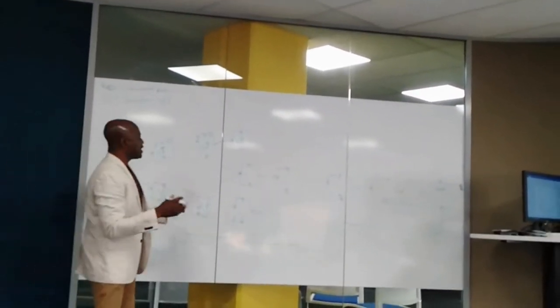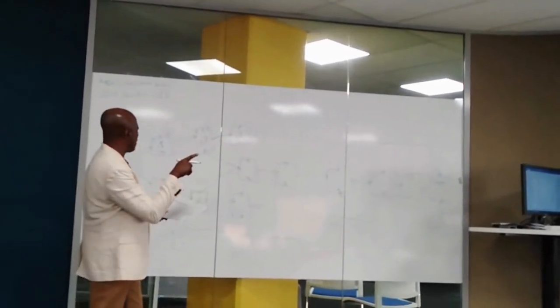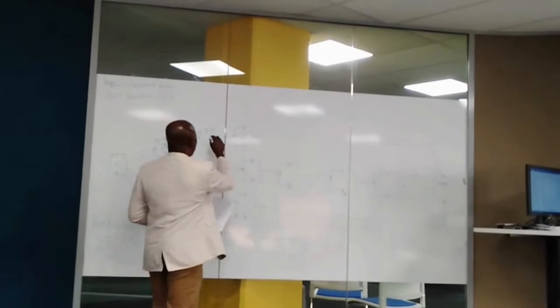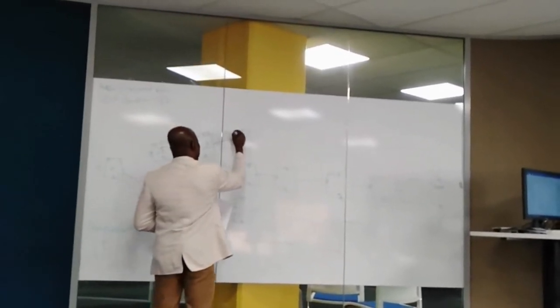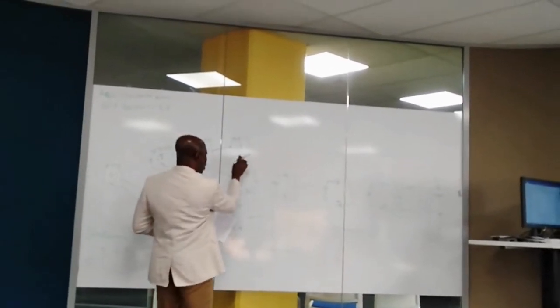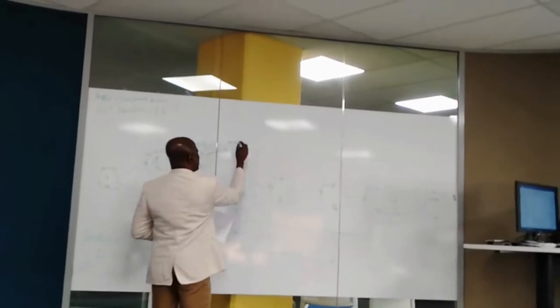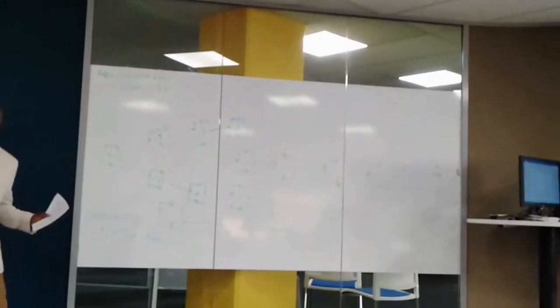So we have activity 4. Activity 4 is dependent on activity 3, is it? Yes, you can see the arrow. So if activity 3 will be completed on 12 days, we can carry the 12 days here. We have the 3 days of this activity on its own. It's going to be 15. That's how we do that.